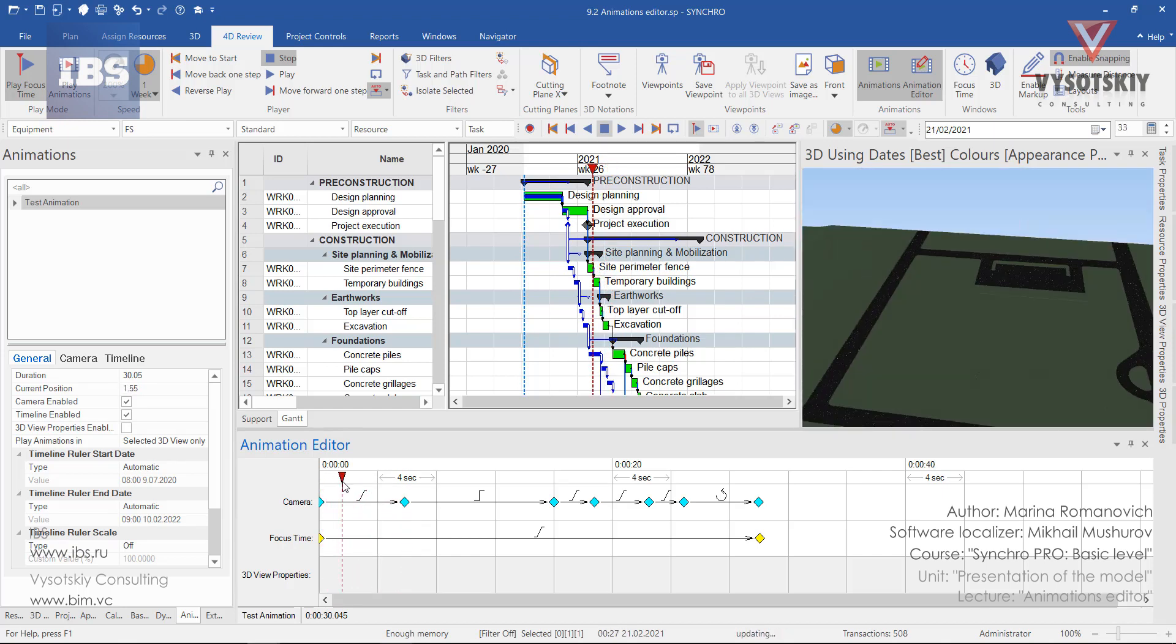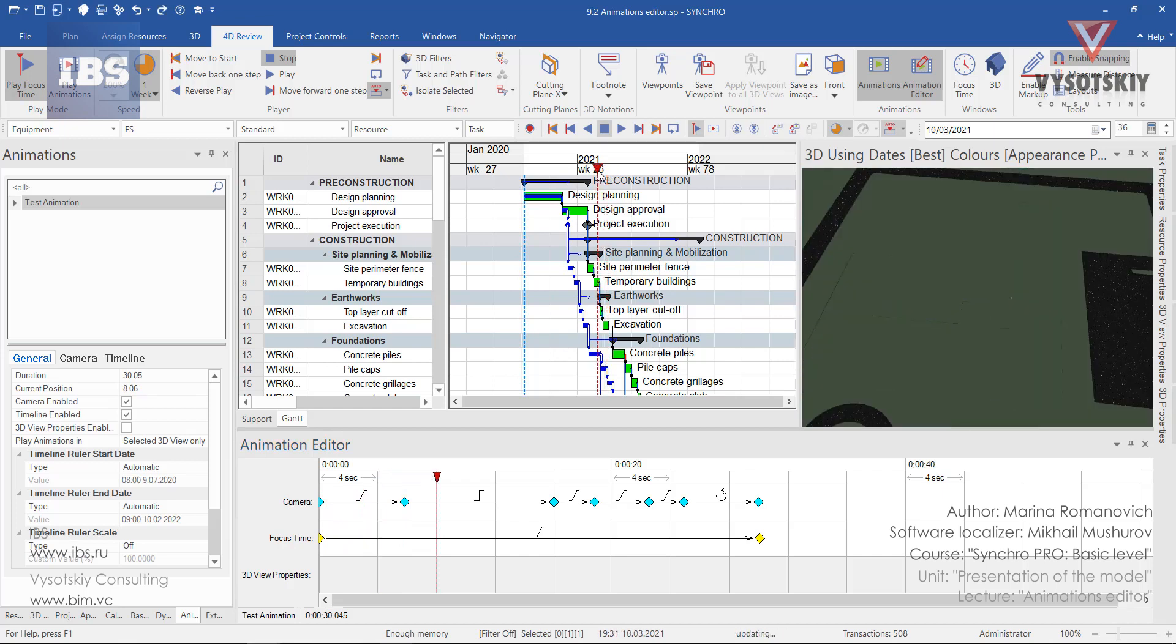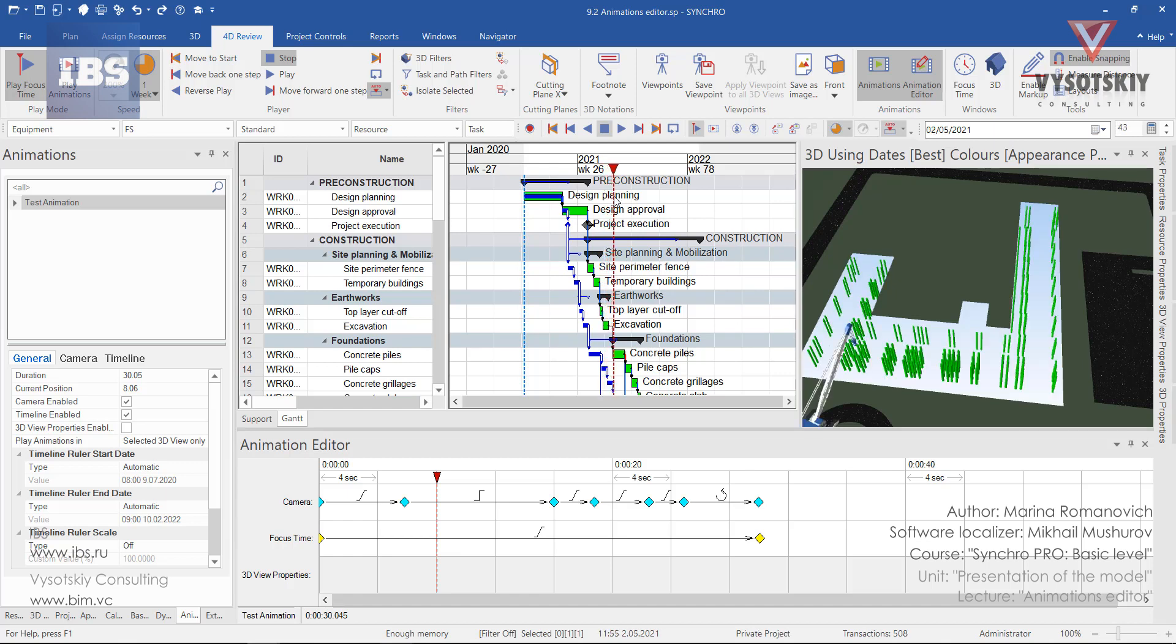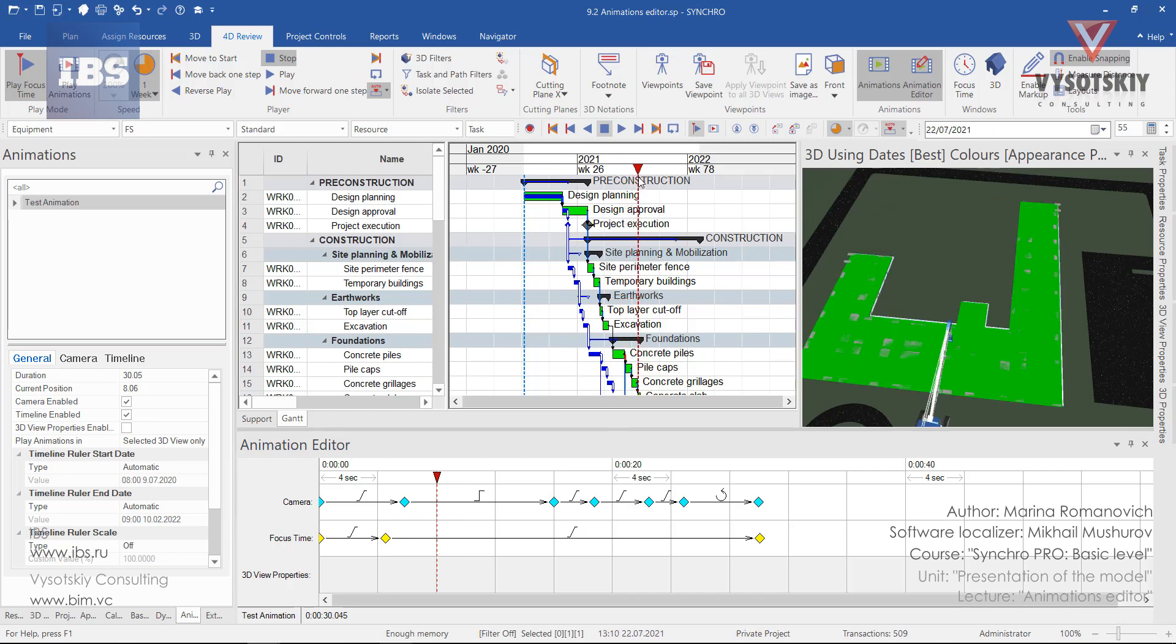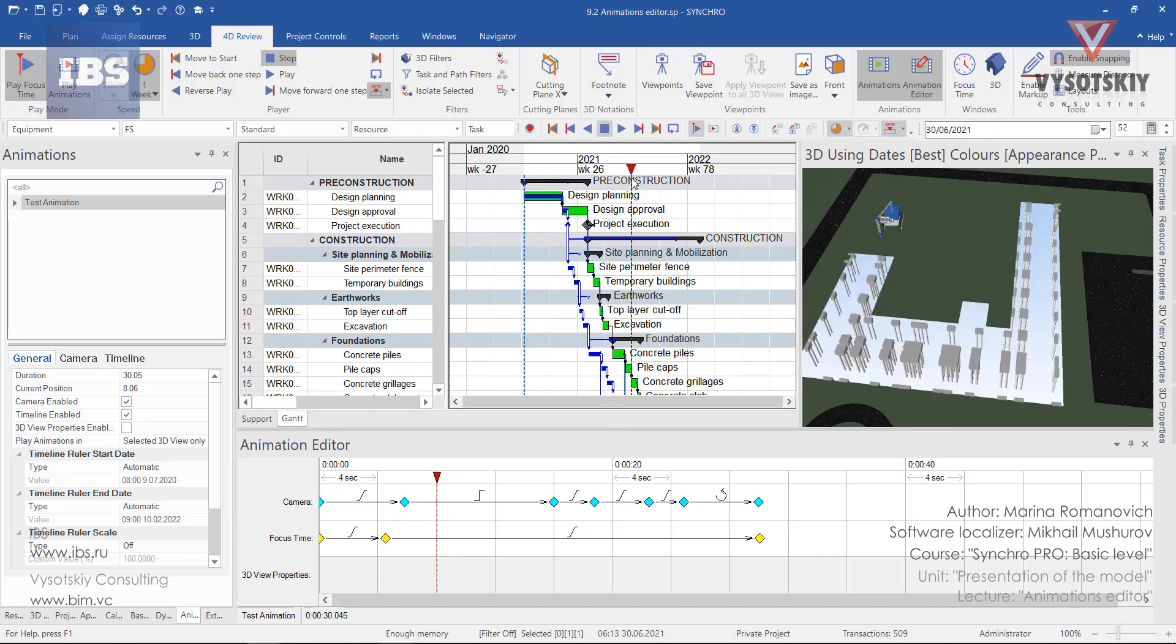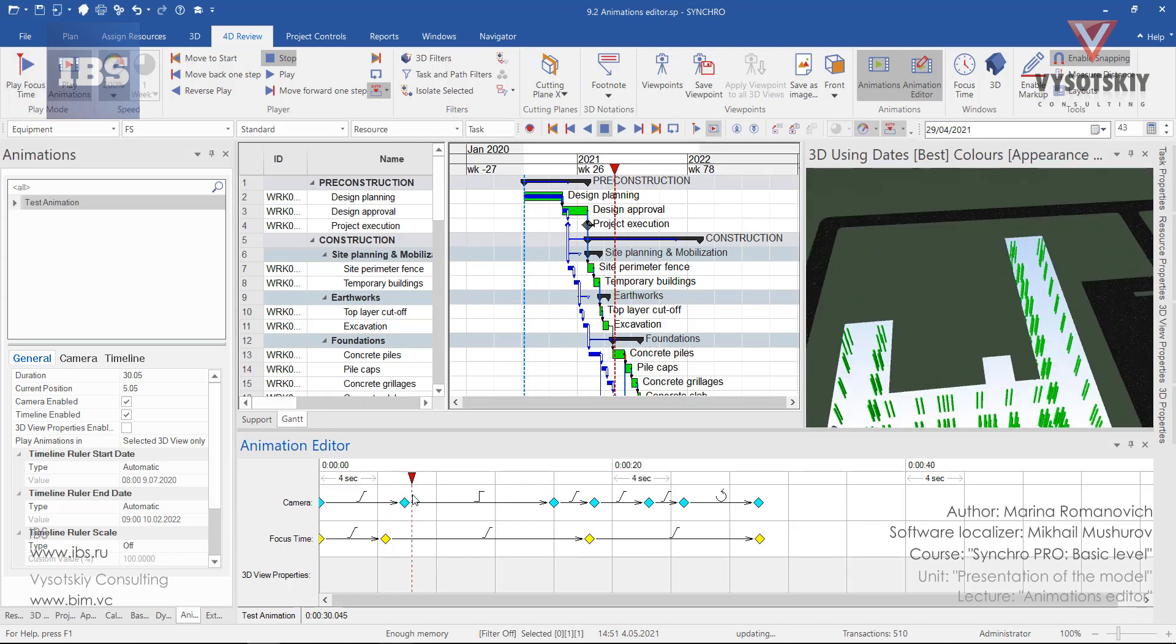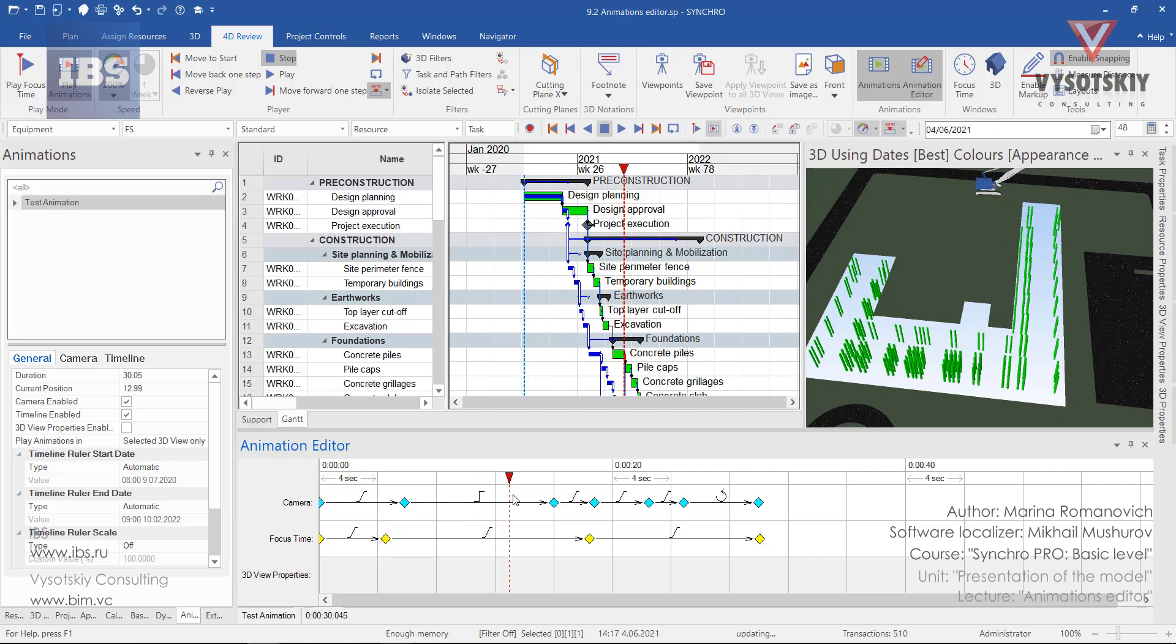Now our construction starts immediately. By manipulating the focus time, we can speed up or slow down some works in the animation. As an example, we have concrete piles, and I would like to see it from here. Now our animation is mainly showing the construction of piles and foundations.